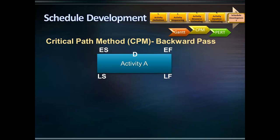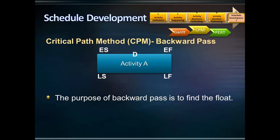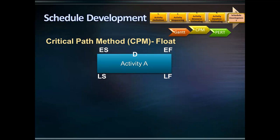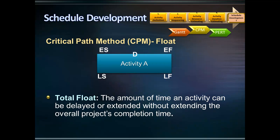What is the purpose of the backward pass and calculating late start and finish dates? The purpose of the backward pass is to find the float. Float is the amount of time an activity can be delayed or lengthened — also called slack. One of the most important floats in project scheduling is total float: the amount of time an activity can be delayed or extended without extending the overall project completion time.